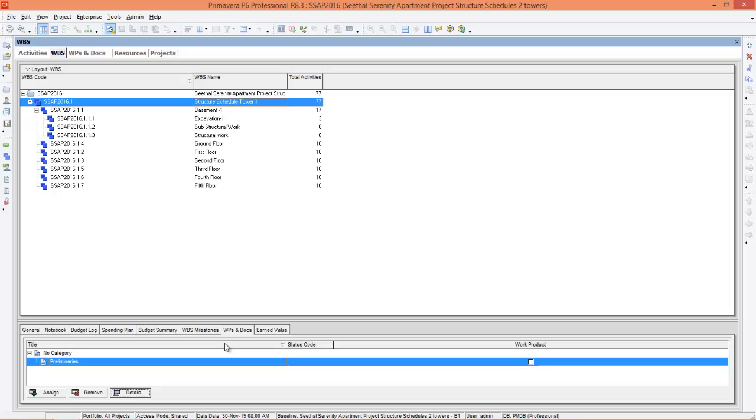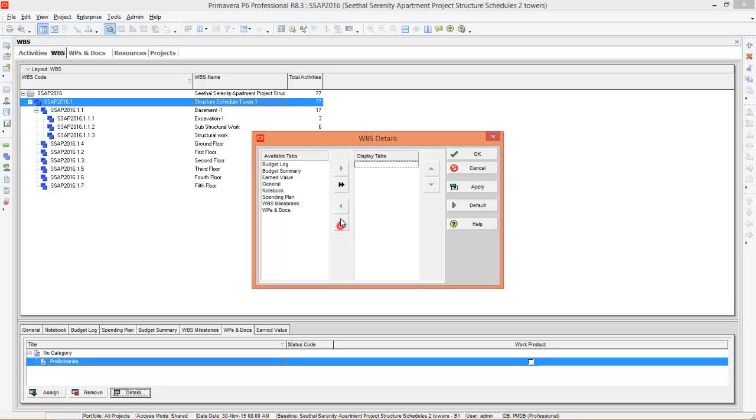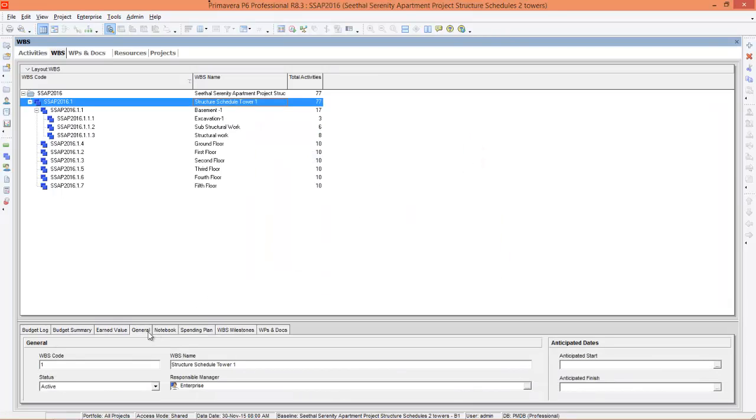In some softwares you cannot see work products and documents here. In such cases you can right-click and say customize WBS detail. These are available tabs, these are displaying tabs. You can move it like this and say okay so that work products and documents will be visible.